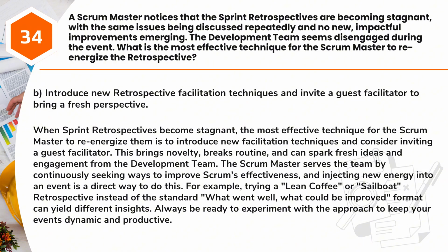For example, trying a lean coffee or sailboat retrospective instead of the standard "what went well, what could be improved" format can yield different insights. Always be ready to experiment with the approach to keep your events dynamic and productive.